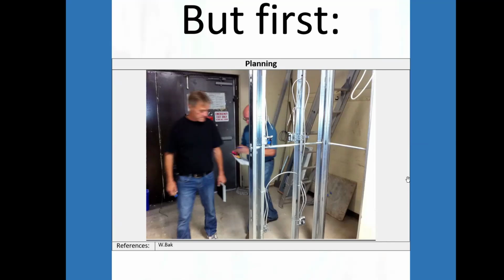So it's not too far, and you can see this is a steel framing. So before we were able to do the installation, before we were able to do the quote, excuse me, we would have to do the survey, and it's extremely important to plan things out.